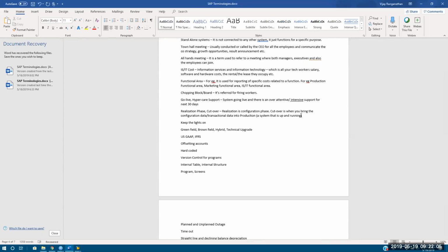There's a lot of cutovers, a big task. They're usually a big project. They have a cutover manager, change manager, release manager. Their only job is to make sure that when the cutover happens, you follow the exact steps. When are you bringing the data? That usually happens overnight, because nobody's using the system. The impact is less.